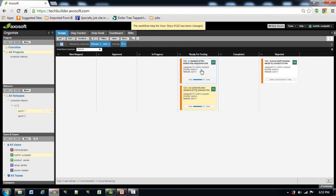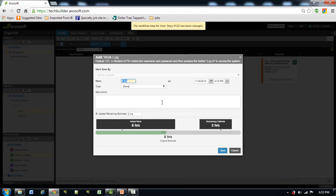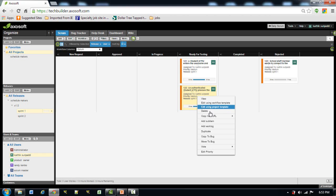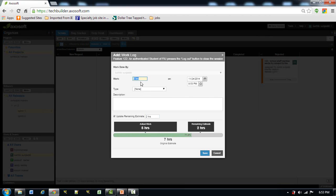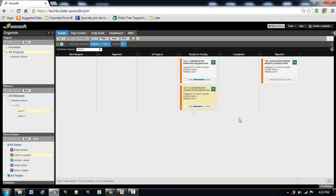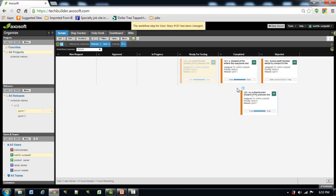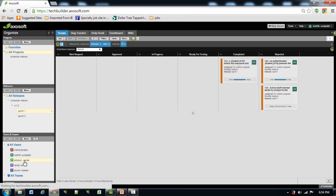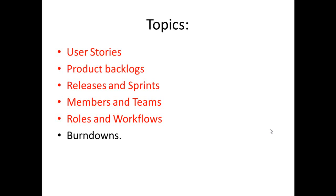After going to In Progress it goes to Testing. While in testing, we assume the developer is also a tester. He tests it, then adds to the work log — the remaining two hours and save. After testing, it can go to Completed, or if the user story did not pass the test it goes to Rejected, which is also possible. However, backtracking is not possible by the user — once completed, they cannot change it. Other users also cannot see or do things beyond what their privileges allow.